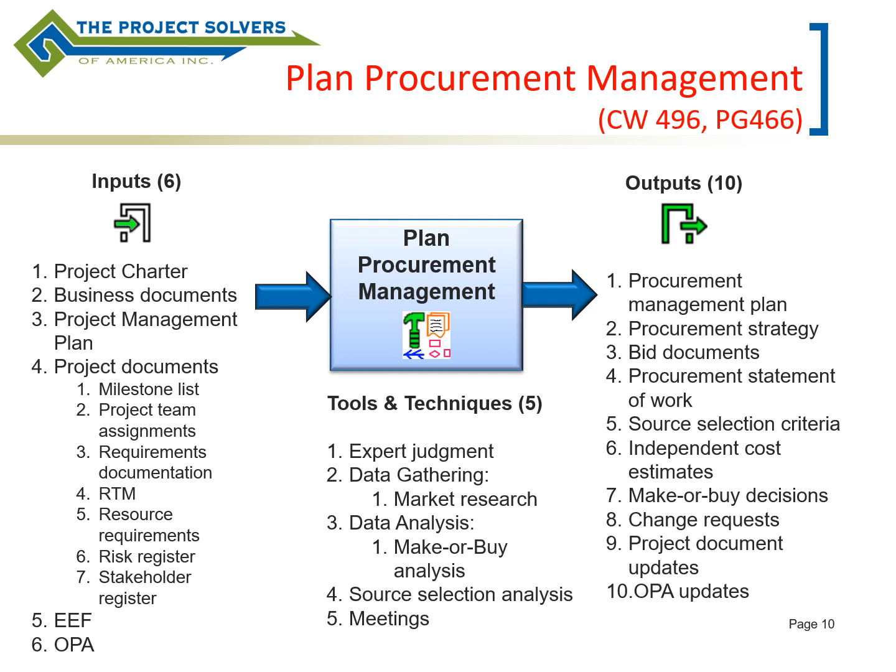Unique to this process, however, it doesn't create just a subsidiary plan. It also makes some decisions, such as whether or not you should even enter into a contract at all. So you're doing a make versus buy analysis here. So looking at some of the inputs, we talked about the standard ones when you're creating a subsidiary plan.